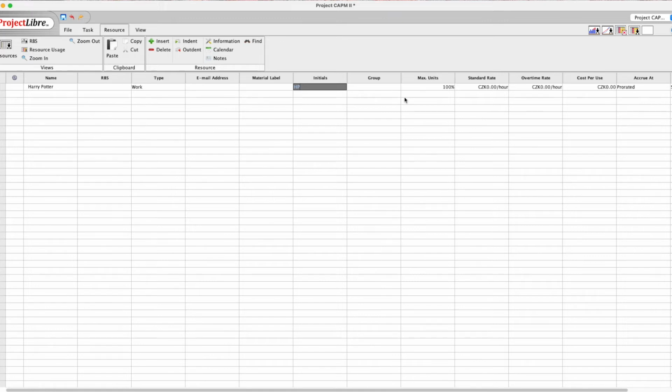We can put an email address, the maximum units that Harry can work. So basically 100% of a day. That's the maximum that we can give. We give him a standard rate of 1,000 crowns per hour. That's typical here, I think, for a project manager, or it depends, 2,000.